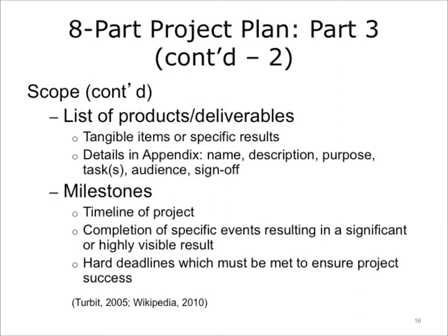Not every task completion date in the project will be a milestone, but every milestone should be tied to a deliverable. Include the estimated time of completion for each milestone. Milestones are targets that should be met. If they are not met, it is likely that the project will not finish on time. Ensure that milestones are clearly identified in the timeline and project plan.